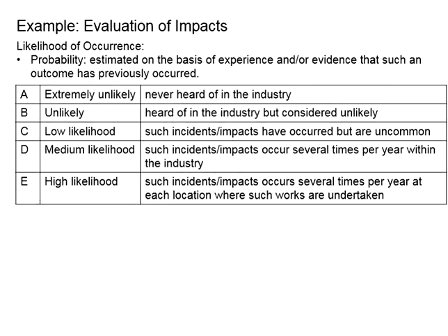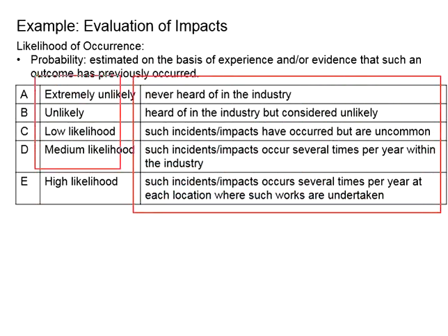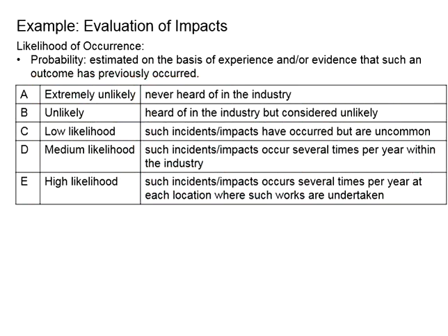Now, if you wish to have a more thorough evaluation in terms of the significance of the impact, you may also consider the likelihood of the occurrence, which you may classify also: extremely unlikely, unlikely, low likelihood, medium likelihood, high likelihood, where there should be clear definitions of the different levels of likelihood.